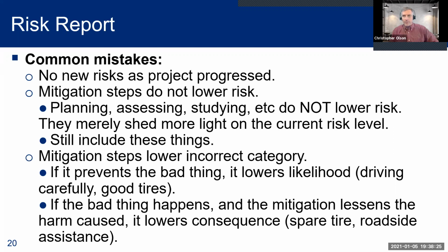Probably not. It didn't even get you to fixing it or assessing or coming up with requirements. None of those things reduces the likelihood or the consequence of risk. All those do is either get you ready for the next step or shed more light on the current risk level, but that doesn't mean don't include them, because you might need them in order to do the next step, which would reduce the risk, right? So just keep that in mind.